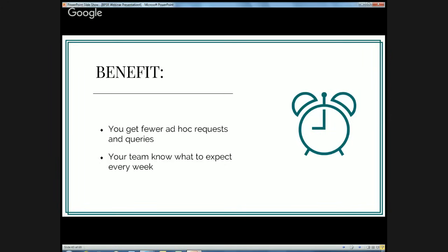I wrote a weekly report for a project I was working on. I forgot to include a pretty major problem that the project had suffered that week. It was resolved by the time I was writing the report. We had it resolved by Wednesday, and I did the report on the Thursday. But I should have included it because it took time from the team. You should include these things that are flagged as big issues.